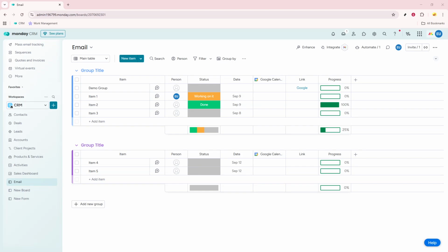In today's video, I'm going to teach you how to add a milestone in Monday.com. A milestone, in the context of project management with Monday.com, is a significant point or event that you mark within your project timeline. It's different from tasks or activities, as milestones represent key dates or deadlines that indicate important progress points in your project. In Monday.com, these milestones are beautifully showcased by a diamond icon when you're viewing your project in timeline or Gantt chart formats, allowing you to quickly and easily see these important markers.